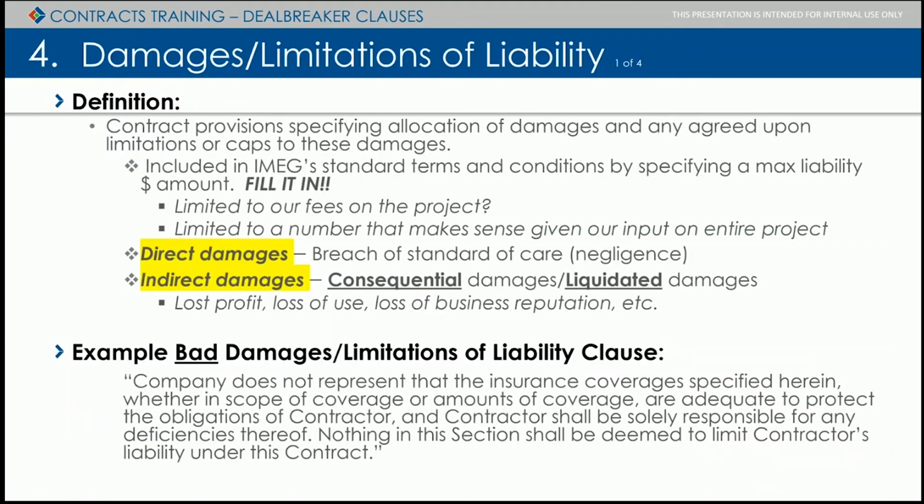This is a pretty quick one, but still very important. You'll notice IMEG standard terms and conditions. Some versions that are out there have a dollar amount of 10,000 in there, and then some others are blank. Either way, the 10,000 is an example only. The better version is the one that has it blank. If you can get a client to agree to limit our liability, you should do it. That's a huge win for us.